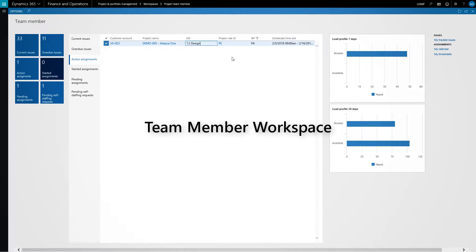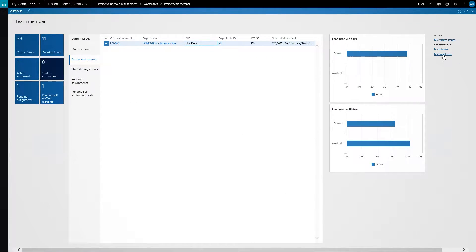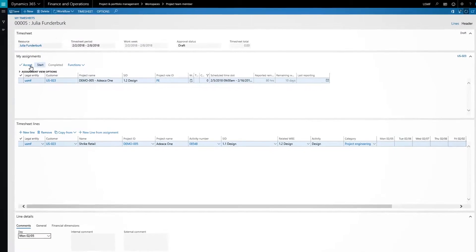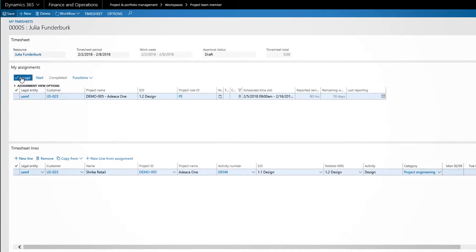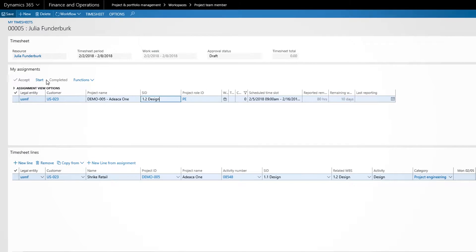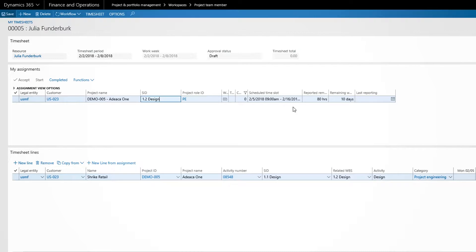In ADECA 1, the timesheet interacts directly with the WBS and resource assignments. Project team members are presented with current assignments for easy and error-free time recording.